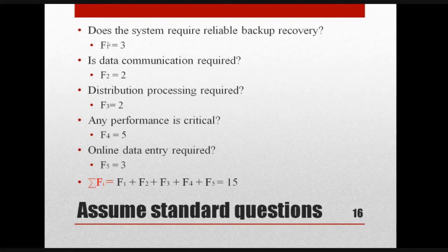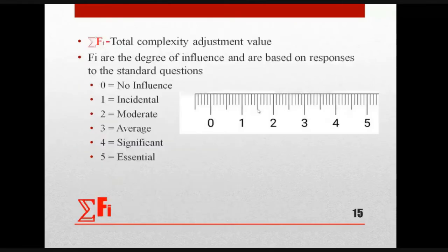Whether this project is having data communication, yes, it is required. Distribution processing required, yes, it is required. Any performance critical, yes, many performance is critical. Online data entry is required, yes. So likewise, we'll be asking some standard questions, and from these standard questions, we are able to identify the range.